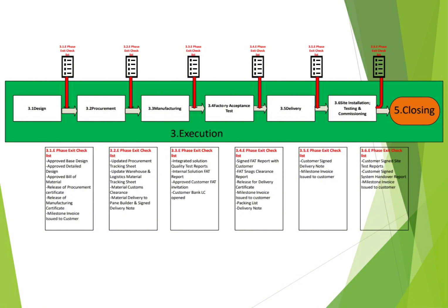So based on the Incoterm, if it is delivery duty paid, you need to deliver to your customer site, or if it is ex works, the customer needs to arrange the collection of the material from your FAT area.